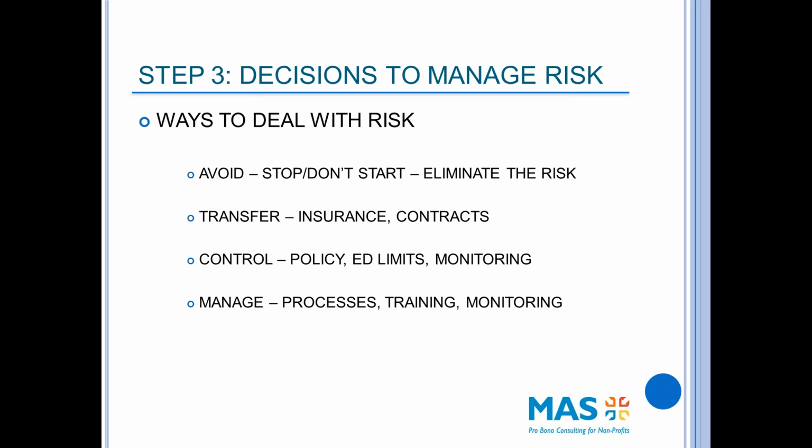And then the fourth way that I can deal with risk is to manage it. I accept it, I'm going to live with it, but I manage it by developing processes that either minimize the likelihood or the impact. I do training of staff so that staff understand how to deal with this, and I do monitoring.